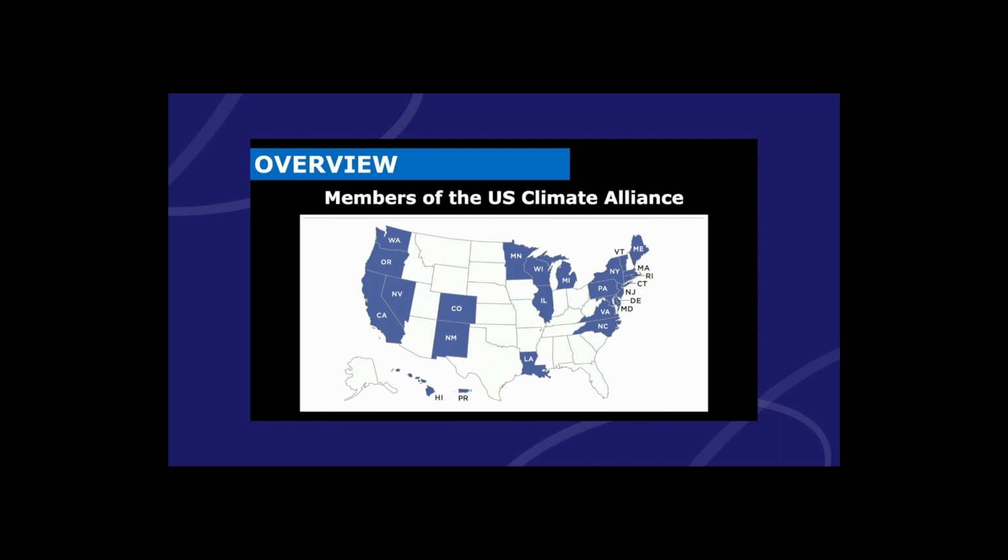Yeah, and just a couple other additions. I do agree with what both the other presenters said, but as an anecdote to understand the landscape in the United States, we actually just had a new nuclear power plant come online in Georgia last week. It was supposed to cost $14 billion and it cost $35 billion. So I'm not saying we can't or shouldn't continue to deploy nuclear, but it's risky on multiple perspectives.